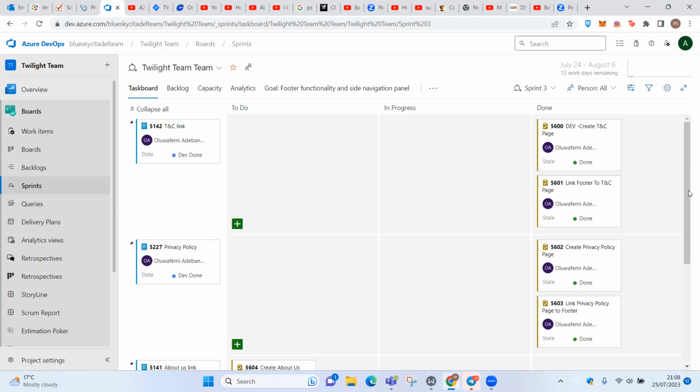During the sprint plan, once you've committed everything to the sprint, the team comes on this board, and the developer assigns the story to themselves. You will definitely have more than one developer, so they assign the story to themselves: I'm taking this, you take this, and all that. They collaborate together to do that.